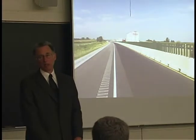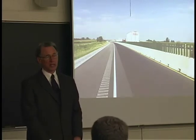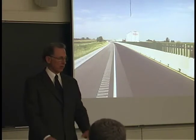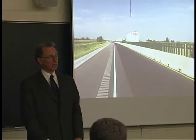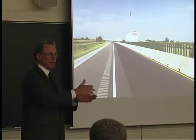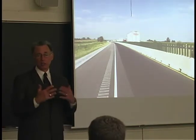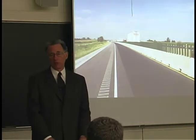As a matter of fact, a big part of a project carpenter foreman's or a project supervisor's job is to figure out what he can do with a 4x8 sheet of plywood so he can salvage that. If he lays it this way, he can salvage the whole thing, but if he decides to lay it this way, he has to cut it up into 4 pieces. We can't use those 4 pieces any longer. So he's really increased the cost of what he's doing. So the way he plans his forming is very important.